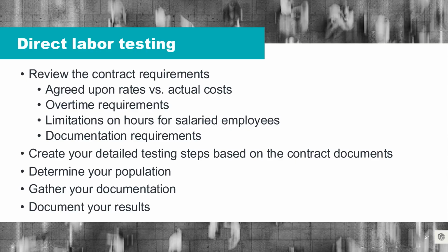You also want to check what the contract says about overtime. Is overtime allowed, and under what conditions? You'll see that some contracts might allow overtime, but only with prior written approval, or that overtime is billed at 1.5 times the straight time rate.